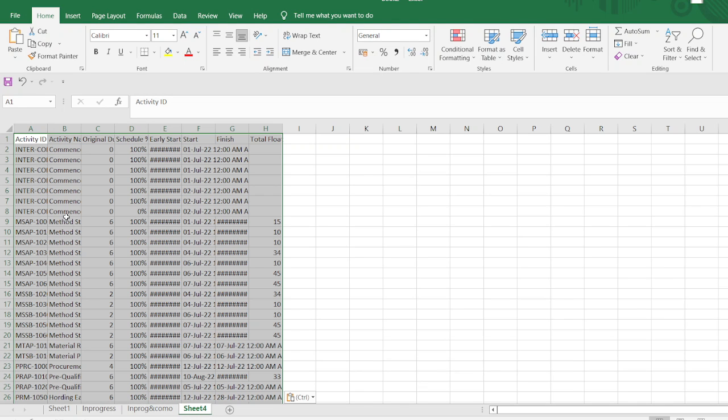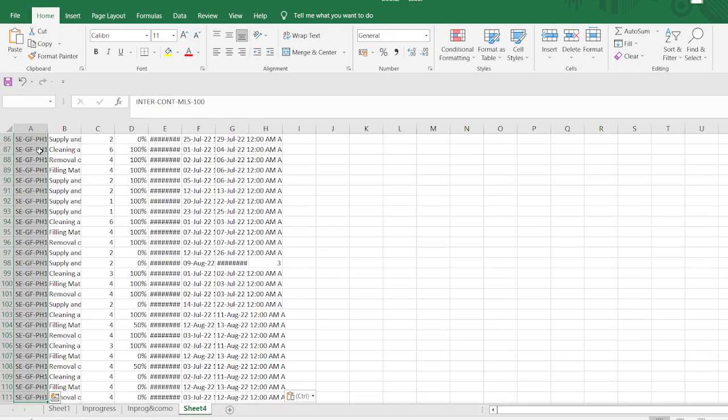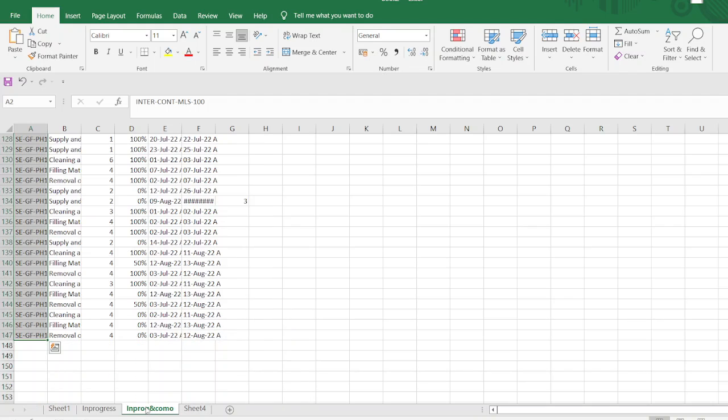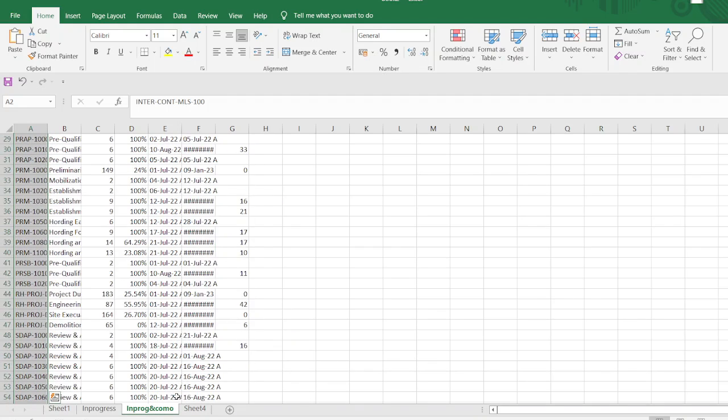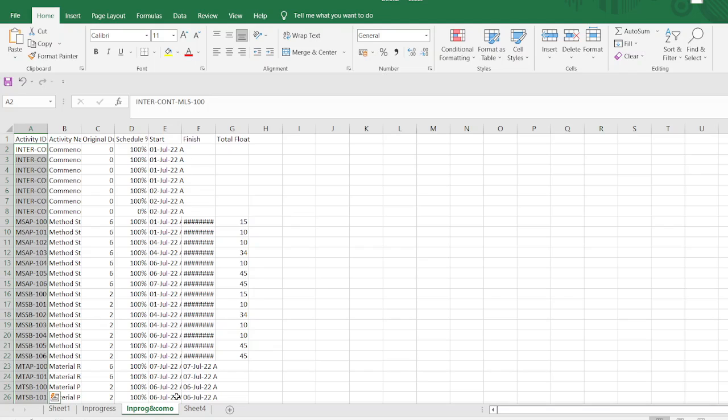In this case, if you go here and check it out, see how now we have 110 activities. This means that because of these issues of dates and timing, it shows you more activities in the filter. So no worries. We just have to determine that when we remove out of sequence activities, it will not impact anything. Out of sequence activities have to be removed in two ways. We can do it with the use of Excel, which is very fast, but some activities we cannot do with the help of Excel, and we have to do it one by one, each activity.